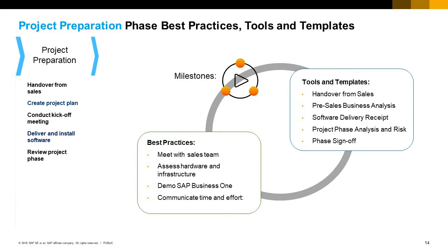The recommended SAP best practices for this phase are: meet with sales team before the kickoff meeting to understand the customer processes, goals, pain points, unique requirements, risks or constraints, including major changes in the future or an upcoming busy season that could jeopardize the project. You should ensure that customer expectations set during the sales process are feasible and that product capabilities have not been